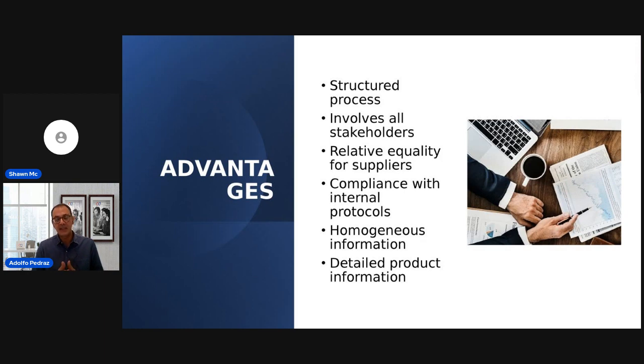Or, for instance, the public sector, by law, needs to start this RFP process or bidding process in order to be able to buy this kind of software. So the RFP process allows them to comply with this without any problem.